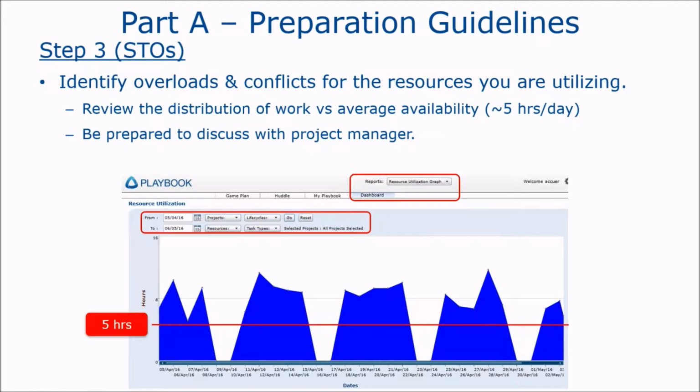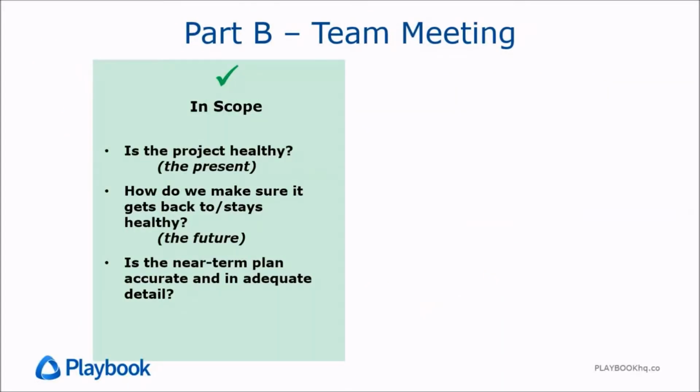So that tells us that we don't have a realistic amount of time built in to our project timeline, or it means that we need to get this person some help and do some parallel processing, or we need to de-scope and not do all the work. There's different things that we might do, but we want to be aware that our project plan has an unreasonable amount of loading for the resource, especially our critical resources, the ones that are on the critical path. And we want to make sure we're prepared to discuss those with the project manager and bring those things to the project manager's attention.